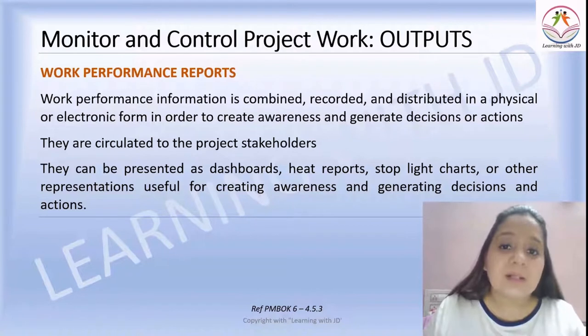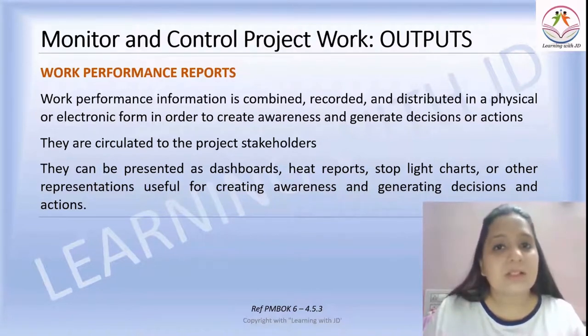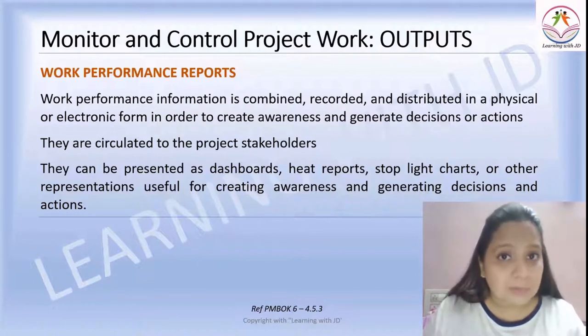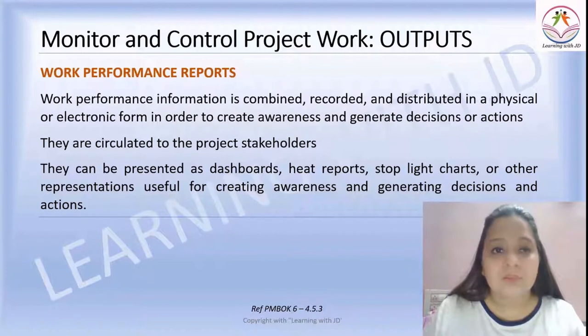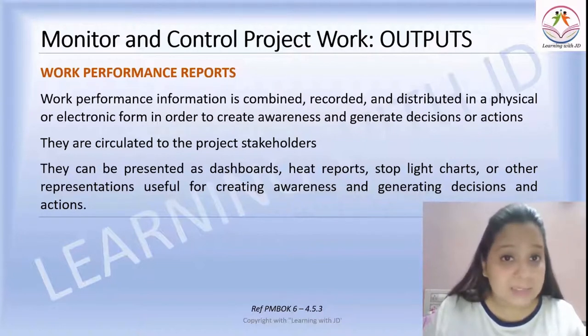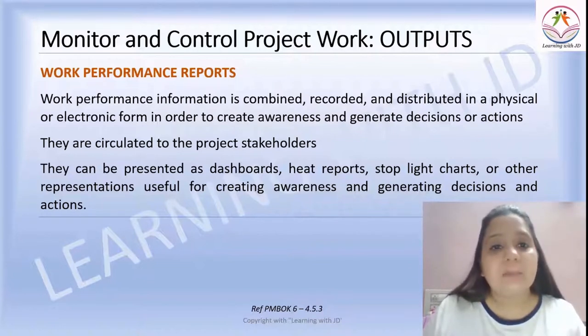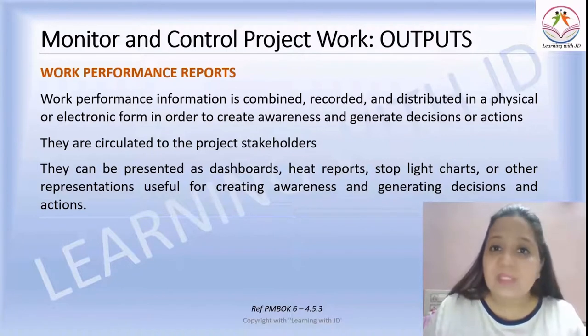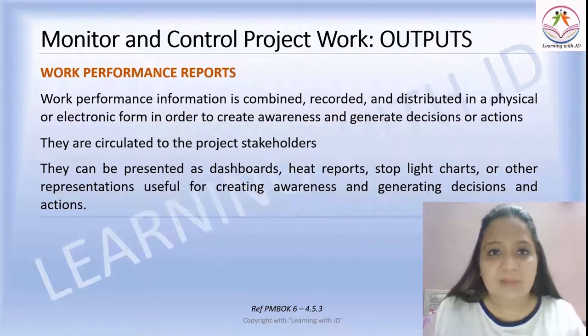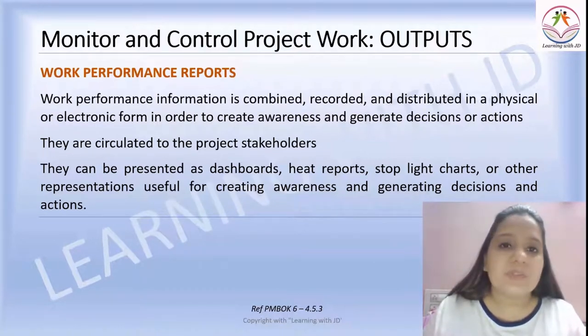This also creates awareness. It helps in generating decisions or actions. They are circulated to all the project stakeholders. Very important, because the stakeholders should know where the project is going and what the status of the project is. They can be presented as dashboards, heat reports, stoplight charts. So these are a number of reports which are available. Any representation of data is known as a work performance report.